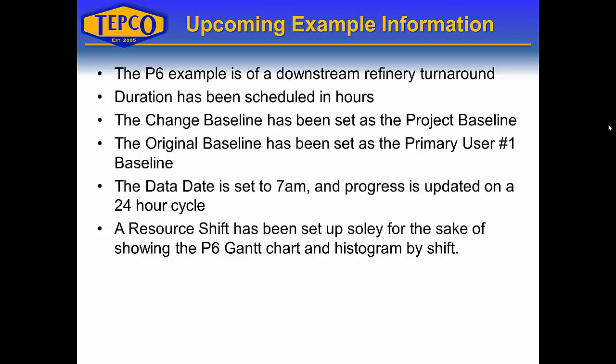I'm going to take you into P6 in a few minutes, but first let me describe the example I'll be building. The P6 example is a downstream refinery turnaround with durations scheduled in hours. The change baseline has been set as the project baseline, and the original baseline has been set as the primary user number one baseline. The data date is set to 7 a.m. and progress is updated on a 24-hour cycle. A resource shift calendar has been set up for displaying the P6 Gantt chart and histogram by shift.